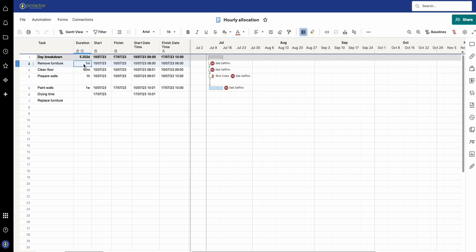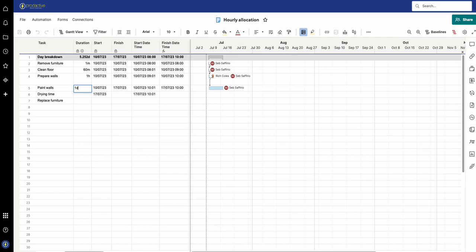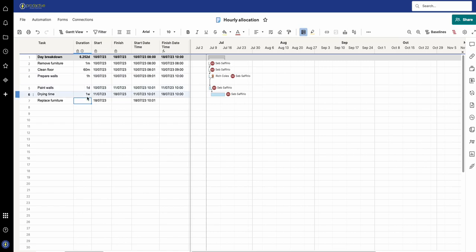You can see I've got 1M and in Smartsheet that means 1 minute. Here I've got 60 minutes which is equivalent of 1 hour, and then I can put in 1 day and then 1 week. This way you've got a whole variety of durations that you can have.